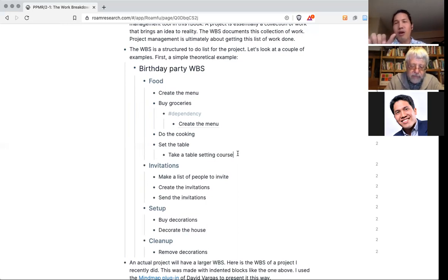within the week, I want another work package to assign to that person, because it's a universal phenomenon called Parkinson's law, which says that work expands to the amount of time you allot to it. So if you allot one month for a task, it will be the same as allotting one week.